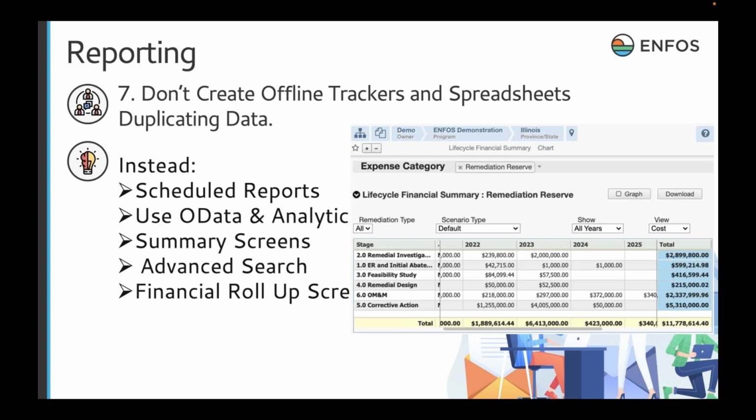I like the finance plans balance screen, right? So in your planning module, there's a balance page for those users that have access. And that's giving you an up-to-date summary as your balance. That's going to include your spend, your open work order amount, your available to commit into other work orders. It's a great summary at the project level as to what your balance is at that moment.